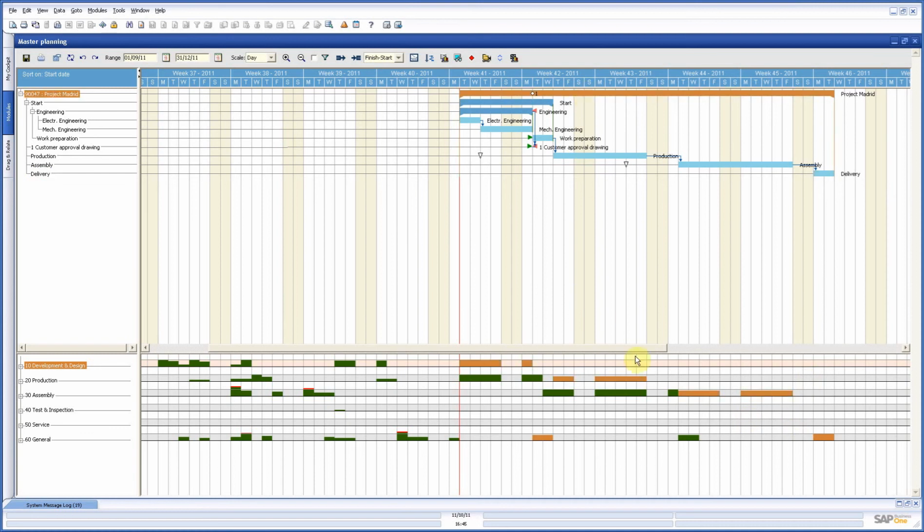So here, in this overview, I see exactly what's happening with my resources and whether I can make this or not. In this case, if I want to start today, this is the way it could work. Now for my material, it's the same. You see here that the triangle is white. So this is today. I have 2 more days to start ordering or producing, and here the same. My milestone is in the future. So in basis, I could say this is perfect. I have no problems. So I can save this one. So my planning is good.